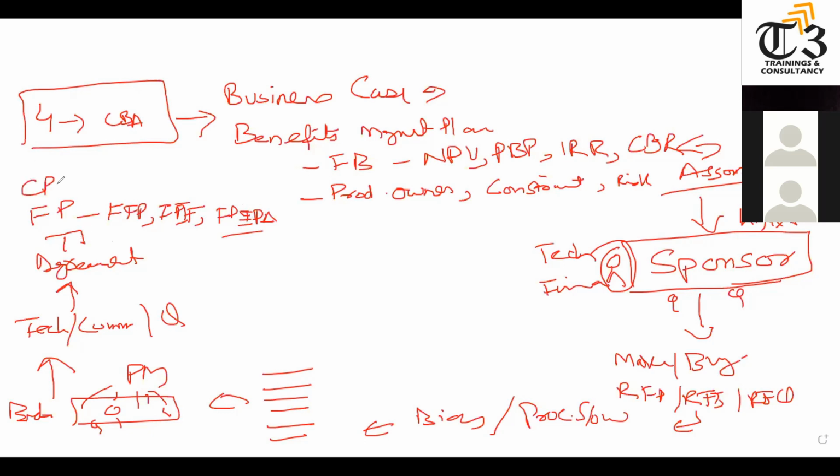Or it could be cost reimbursable, which means you don't know the scope of work. So we could have a contractor hired and he will do the work. Whatever he buys for the project, we will pay him. Here, the buyer is at risk and the seller is safe, and it can also be used for longer-duration projects. It also contains cost plus fixed fee, whatever it is.